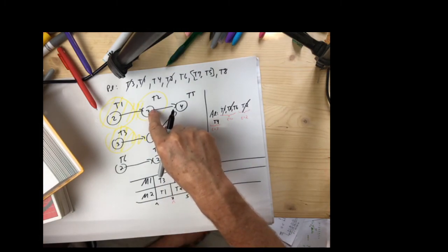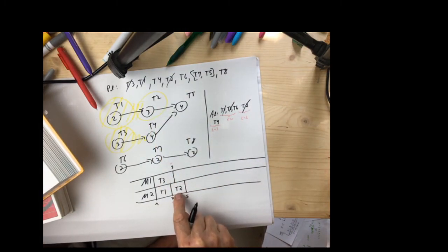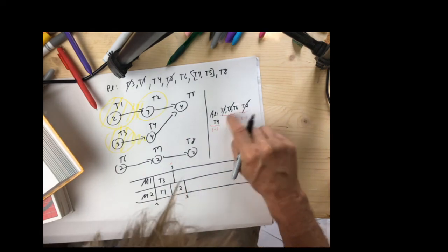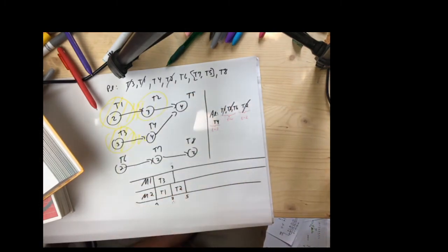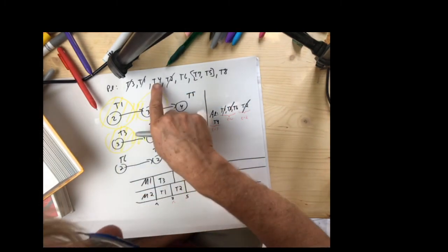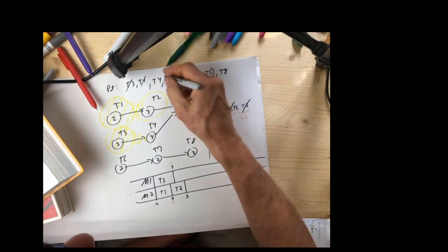So one job is running at time equals 3, T2. Machine just finished. 2 jobs, T4 and T6, waiting to be assigned. I go back to my priority list because I have to make a decision, and between 4 and 6, I pick 4.